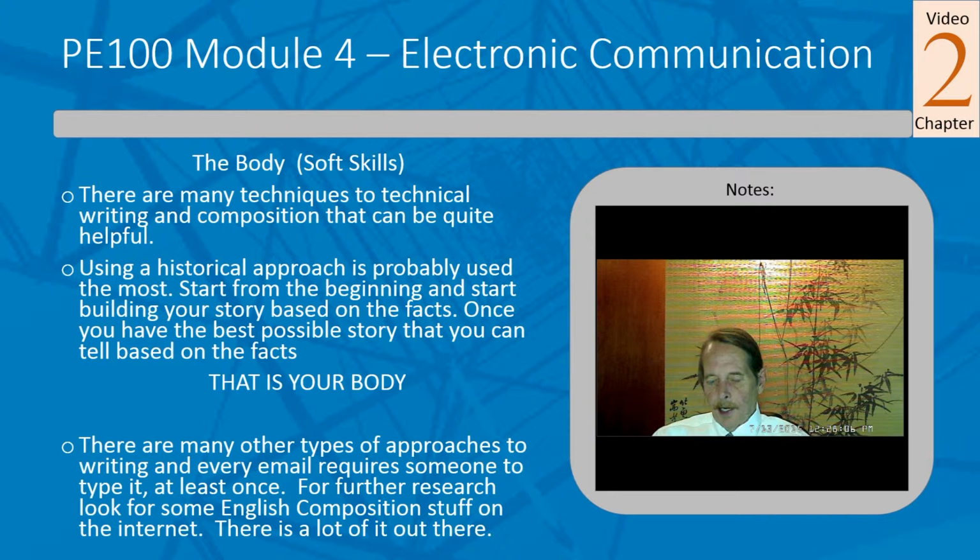And it depends on the type of circumstance. You may be trying to mitigate an issue, which means that we're learning from this and we're seeing some bad trends. Let's go ahead and adjust this, this, and this to overcome that issue. So you're just making a suggestion at that point, but you're factually doing it the same way as if you were justifying a change order that should have been this and it ended up being this. Nonetheless, that historical approach works very well because you have all the data there to really refute or understand anything that's being thrown at you. And that's the trick. Make sure you've got all the data.